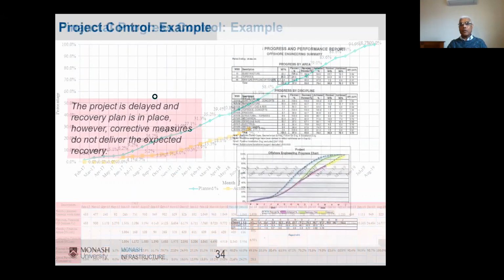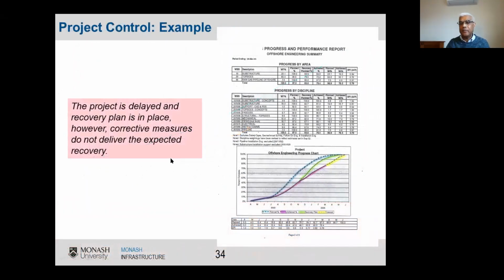The control action would be a project like this. If you look at here, the blue line is actually the budget or the baseline, the schedule. The purple line is the actual progress. So once you plot the actual, now you monitor, and you can see that, hang on, we are lagging behind. We have to do something. Remember the control, the action, the repeat process. And the green graph here is the control measure. We try to come back and get back to the program.